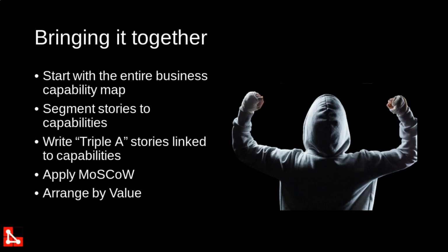Then you build yourself a risk buffer. So you have a budget. And if the budget runs down and you start delivering against the must-haves, and something else comes in, you can still move some of the should-haves and could-haves out. But if you just keep delivering, the chances are you will deliver everything that you need for the minimum viable product.